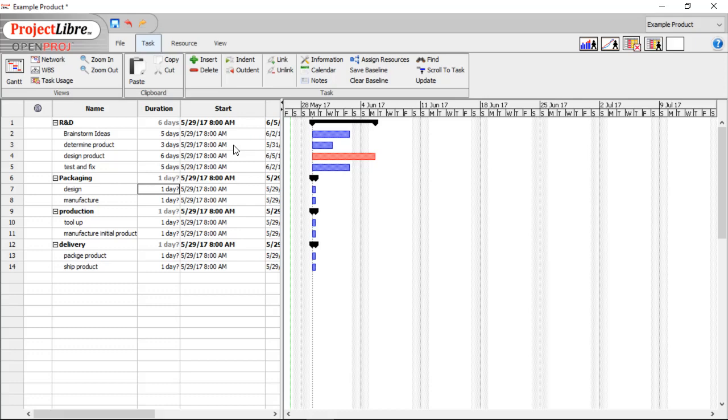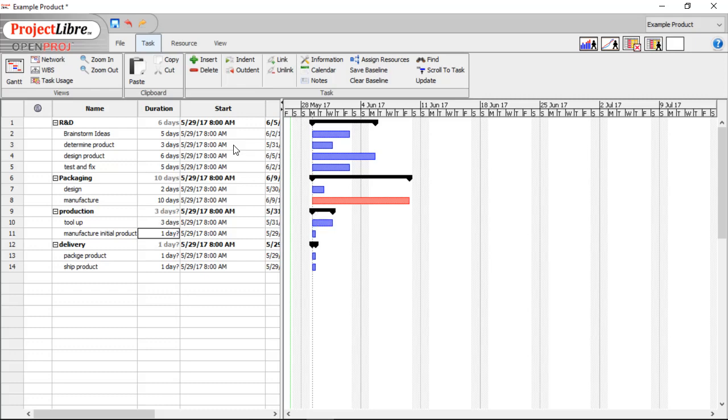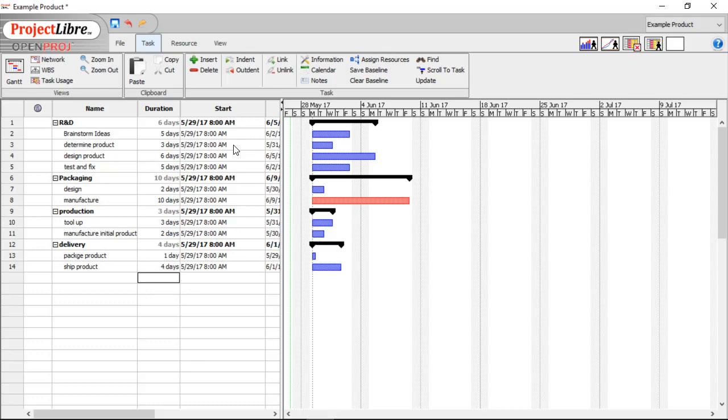So Design Packaging, we have 2 days, and 10 days to manufacture it. Production Tooling Up is going to take us 3 days, and to make our first run is going to be 2 days. Under Delivery, to Package the Product, we're going to take 1 day. And to ship it is going to be 4. Now you include the amount of time it's going to take to actually get to the customer.